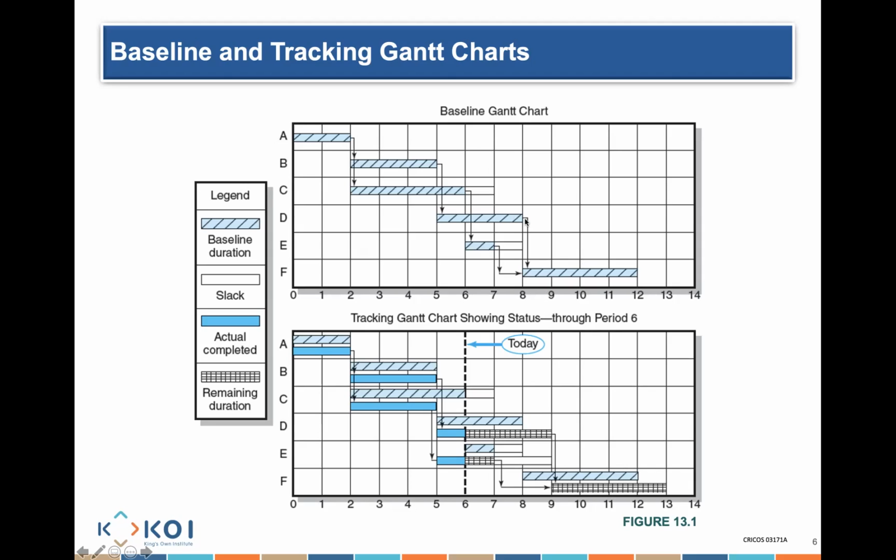So you look here at the bottom. If you see the white one here, that's what they call slack. We believe we can actually delay the activity for 1 day without having any problem on our project. Okay, great. We understand there's a slack available because that activity is connected to another activity.